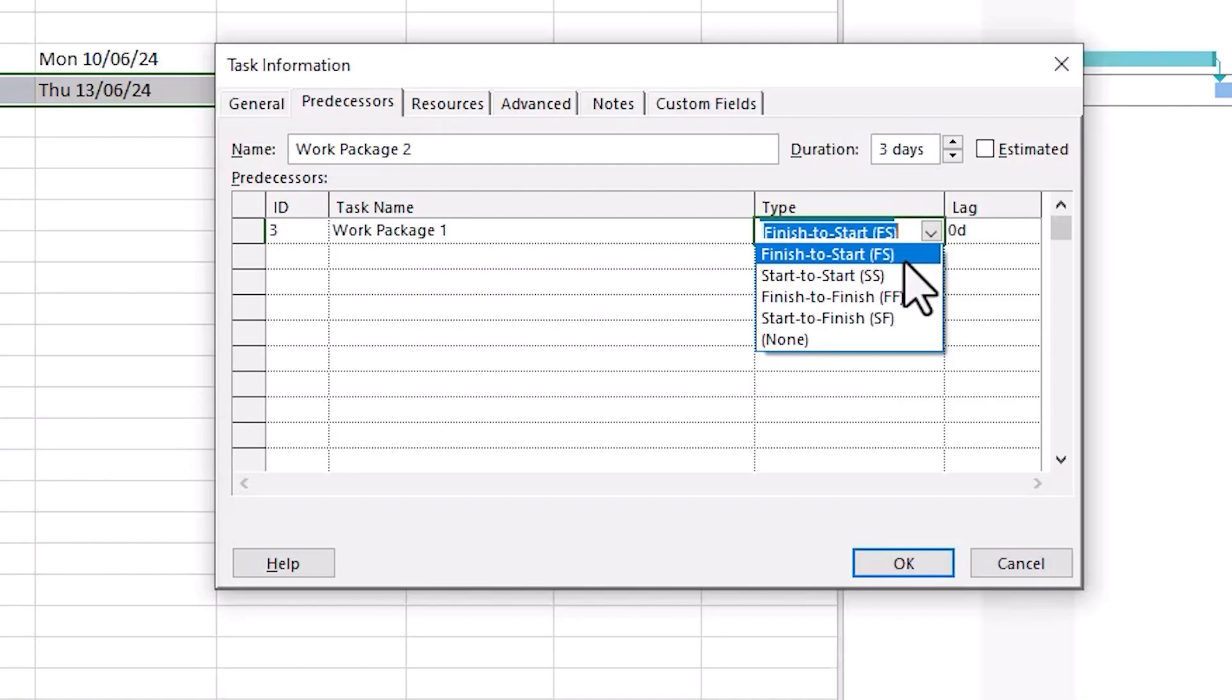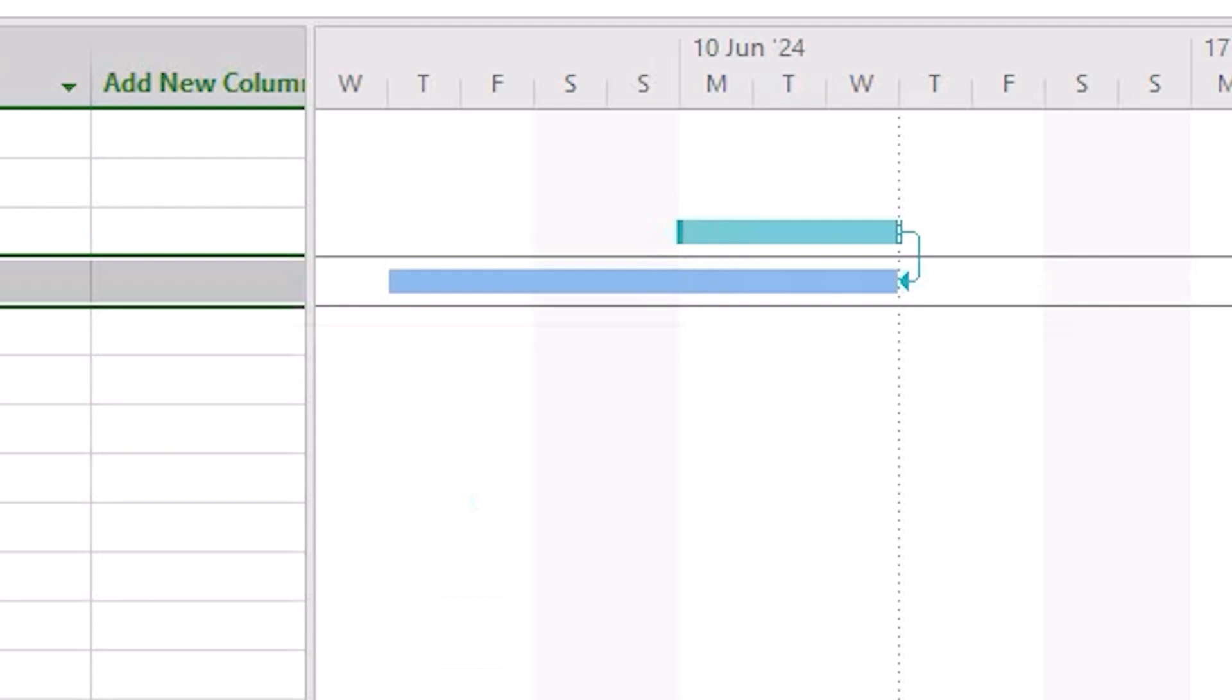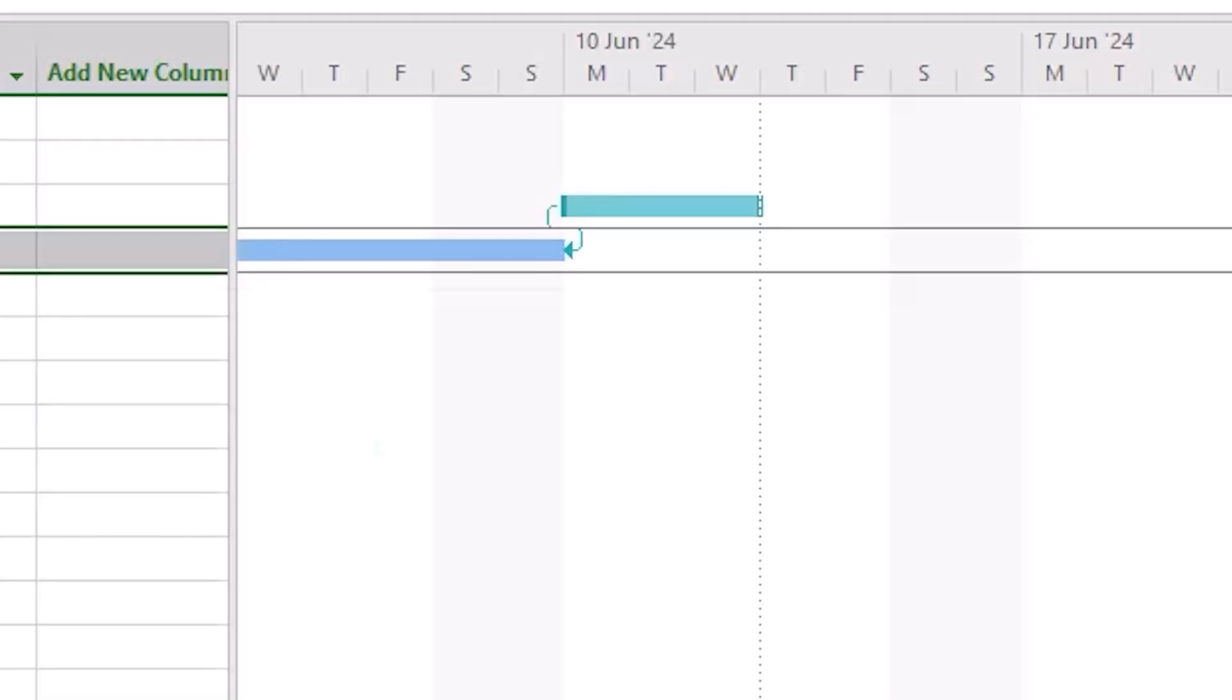You may have noticed a few other options in the Type column. Selecting Finish to Start means our task will start immediately after the predecessor finishes. Selecting Finish to Finish will set the task to finish on the same date as its predecessor, no matter when the tasks start. That can be really helpful when you need multiple pieces of work to complete at the same time. Selecting Start to Finish will have the task always complete immediately before the predecessor starts.